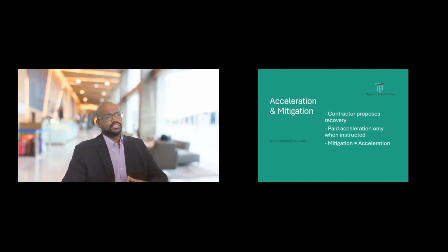So acceleration and mitigation. I have mentioned many times that mitigation is not an option. Mitigation is a mandatory requirement of the contract. And acceleration is mentioned in FIDIC: if there is a request from the employer to accelerate, the contractor has to accelerate, and they are eligible for the bonus or incentives. In case of delays, the contractor has to mitigate their own delays, and unless the delays are tagged to who is responsible, the mitigation still lies on the contractor's obligation.